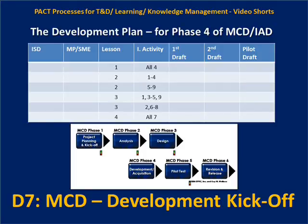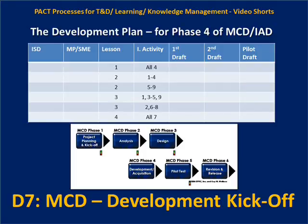Now this is not to say that the name of one developer might not show up in multiple places. It all depends on how we decided to divide and conquer the development efforts of phase four of the modular curriculum development project. In phase four, our goal is to produce the pilot drafts to get ready to go and pilot test this content. Whether or not you think the lessons and their instructional activities only require three drafts — first draft, second draft, and then a pilot draft — or if there's the lesson from Hades and some might have a fourth draft before it's ready to go to pilot, this is something that can be anticipated when the development project manager takes a look at the content and recognizes whether it's going to be relatively straightforward and simple, or very complex and problematic.